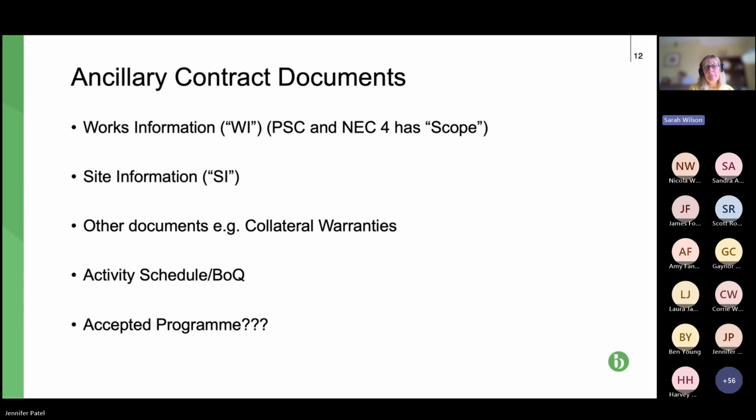So, in my view, in lots of respects, whilst we will need an extra programme, we will need a programmer to assist in an NEC project, I think it is helpful, and I would assume that if you are the paying party, you will have this in mind in any dispute, because certainly in JCT, parties have the lack of a programme in mind as being a huge hurdle for a claiming party. So if we can have the next slide, please.